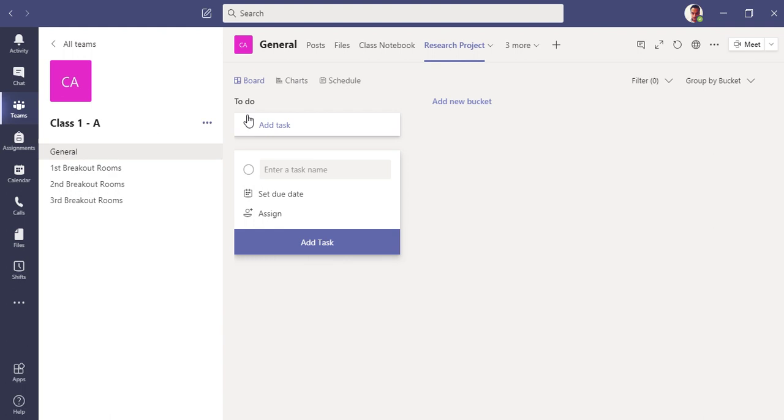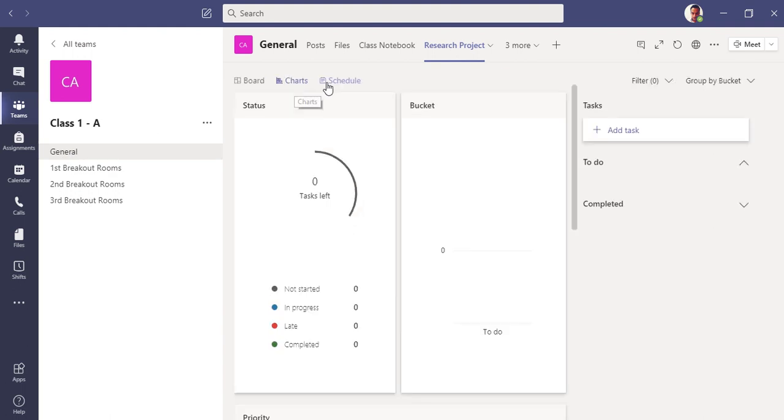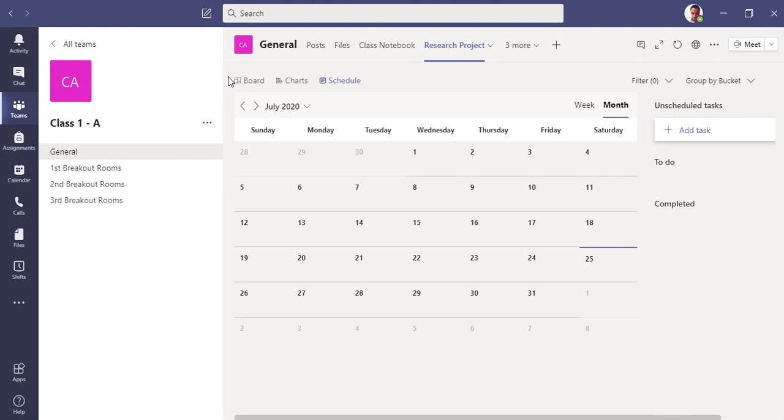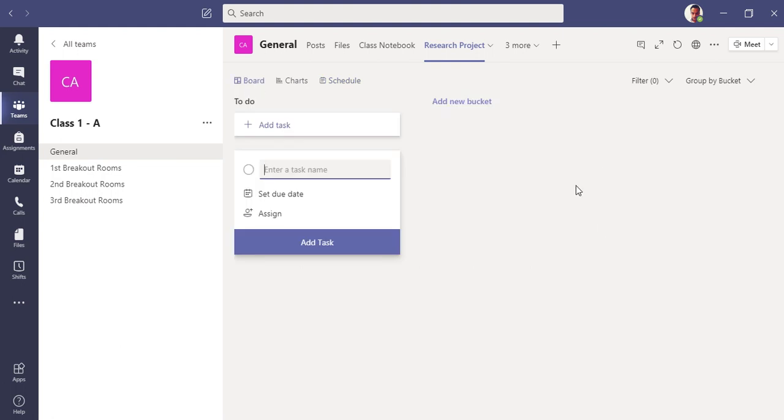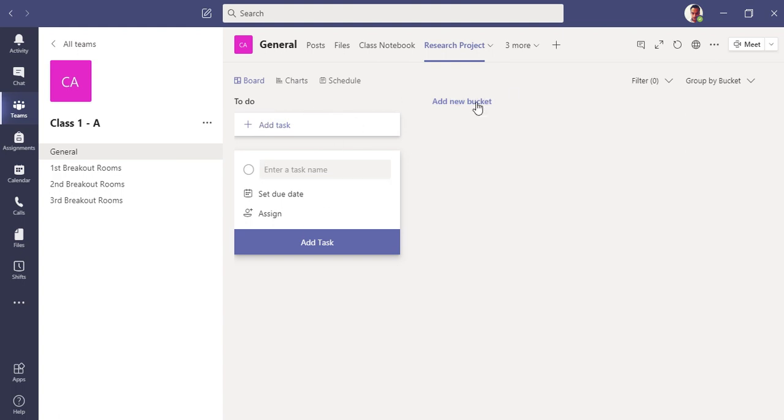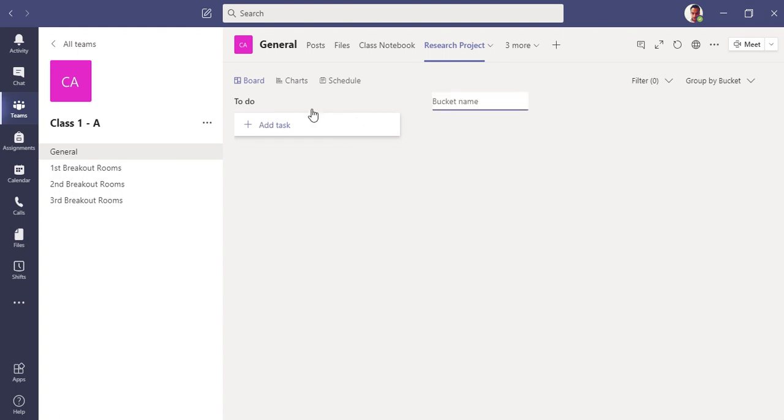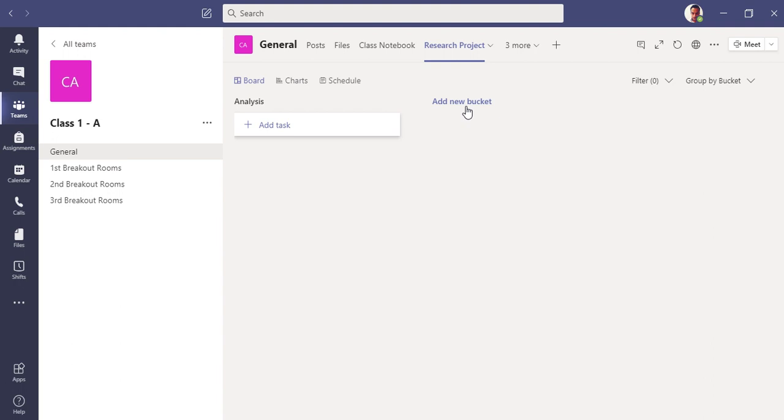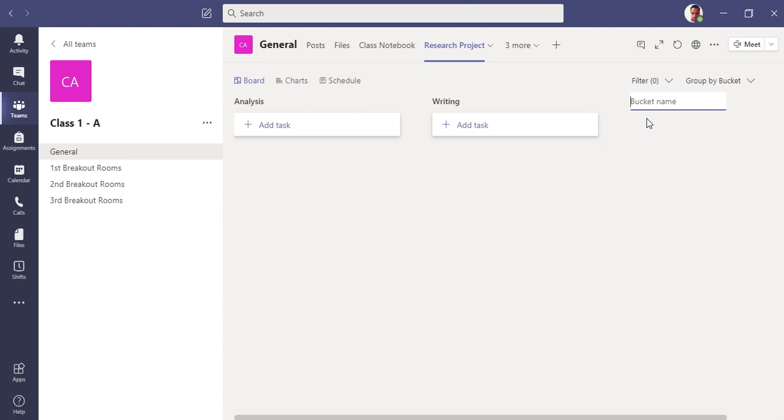This is the Planner application inside Teams. You can see it in my General channel. We have three sections here: Board, Charts, and Schedule. In the Board, it's really like a kanban board. You can see we have buckets. Let me add buckets here: Analysis, Writing, and Testing.